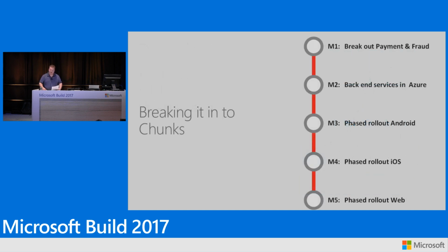Okay, Dave touched on this earlier, how we actually did deployment. So we needed to break down the deliverables into a number of chunks, just so A, you could keep it in your brain, and B, it was actually achievable. So we imaginatively called these M1 to M5, just to break down the problems. And the order of delivery is not random. For instance, the first 2, M1 and M2, were all about releasing the services and APIs to production, which the clients can then consume to rebuild the checkout and the buying journey. This had various advantages for us, so we actually carried out quite a lot of production performance testing and functional testing before anybody even consumed any of these services.